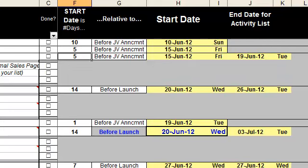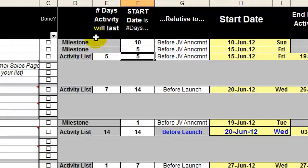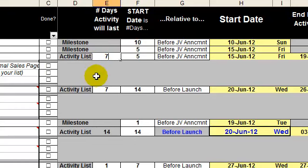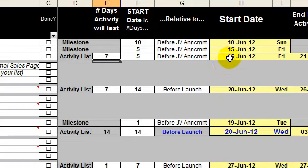Of course, I can change any of those figures. I can change that to be seven days if I want the conversion stats to take longer, and the start date then becomes the 15th of June.